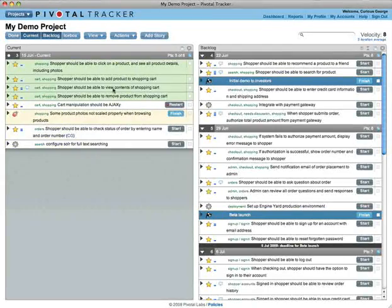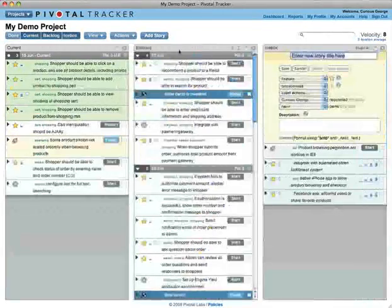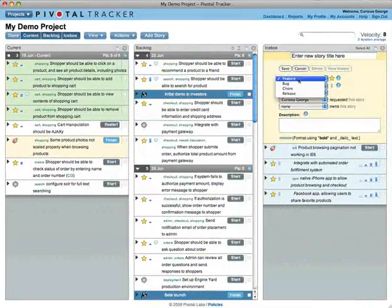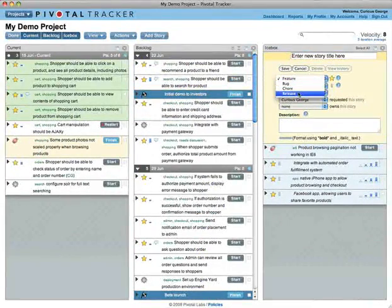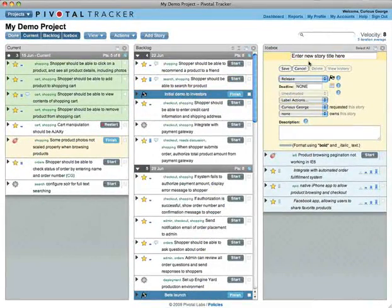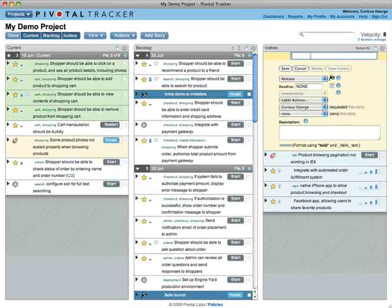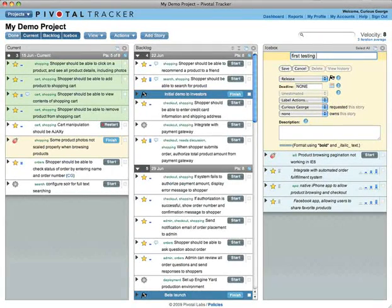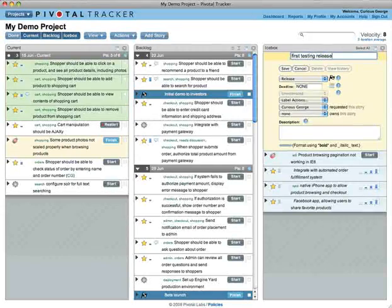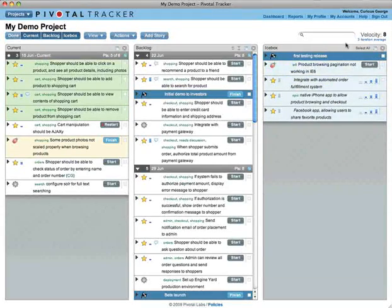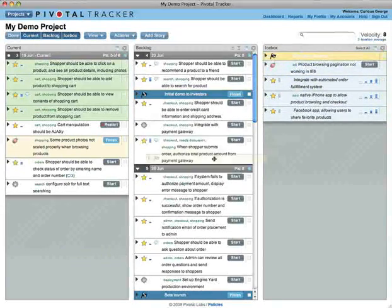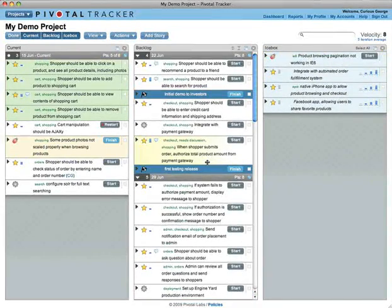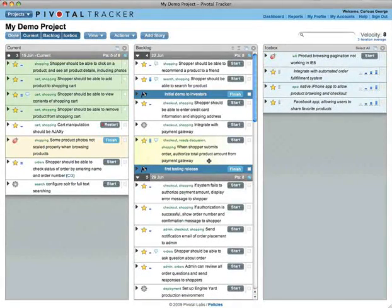Most stories are features, but there are also bugs, chores, and releases. These aren't worth any points, but they help you keep your team appraised of everything that is going on or needs attention. Release markers help you track progress towards your most important milestones.